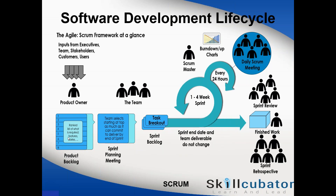The second most important responsibility of the Product Owner is to prioritize the backlog. A backlog may have 300 PBIs, but not all are of equal importance. Some may be critical, some less important, and some may not need implementation at all. The Product Owner decides the weight of each PBI and prioritizes based on the business value it gives to the organization.